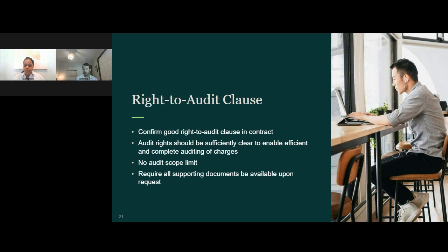So we recommend monthly. We have projects that are 500 million, $1 billion plus, and we get that level of information monthly. And that level of information is important because you can detect early on issues. And what we tell everyone, it's very easy to talk to someone about a $500 or $50, $5,000 disconnect. When you start adding zeros, the equation gets more complicated. So having the right to audit clause, getting the information fully substantiated, early stages, we find most contractors, they want to be compliant.